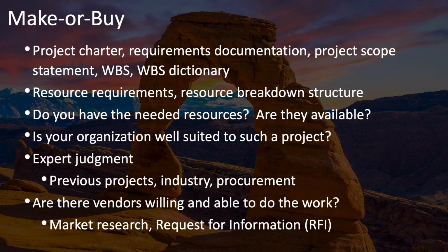Let's take a closer look at these steps. The first is your make or buy decision. In order to decide whether you should be doing this work in-house or outsourcing it, what are some of the resources that you have available to you? First, you should take a look at your project charter, your requirements documentation, your project scope statement if you have it, as well as your work breakdown structure and WBS dictionary. These can provide you details of the scope of work that needs to be done that can help you decide whether this is something you can do in-house or not.